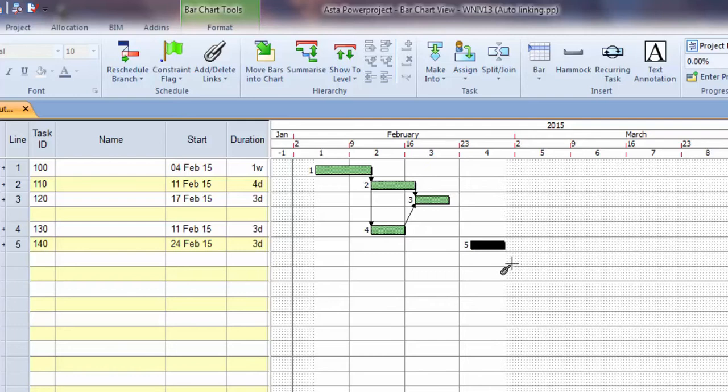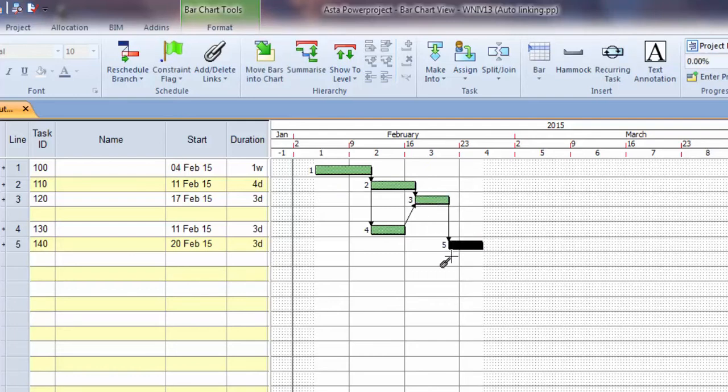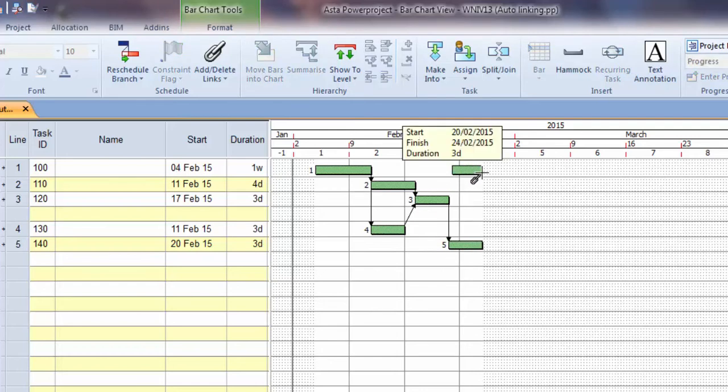I need to click away before I can draw another task that won't be linked. And then of course I could say, well, this one is linked to that one. So as you create links, but it will only do finish to start things.